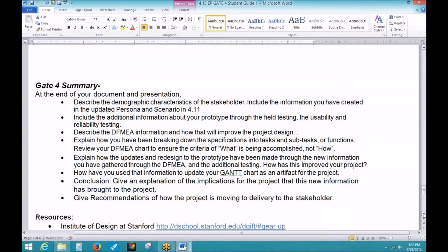They went clear back to specifications on their design, and they'd been at it a year, and they had to go back and really look at the whole thing again. But they had all the documentation, so it didn't take them as long as the first time, but they still had to look through it and go back through it. So documentation is huge.